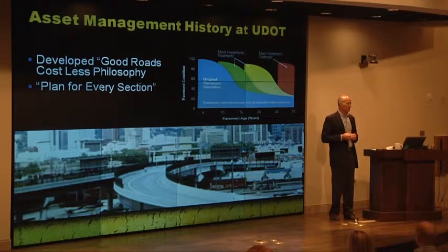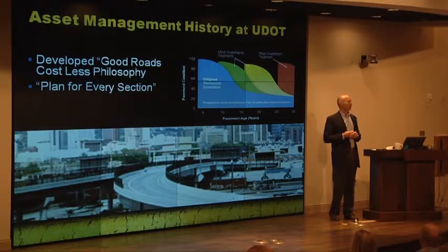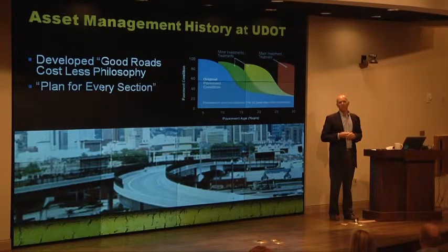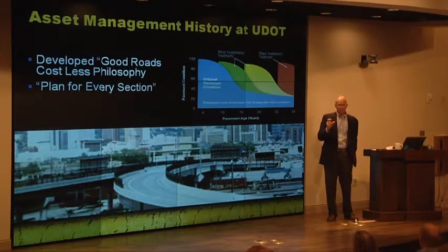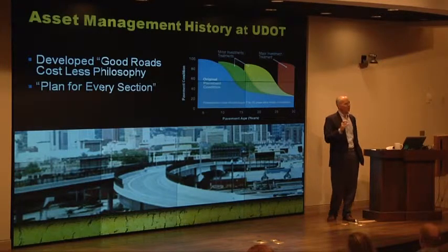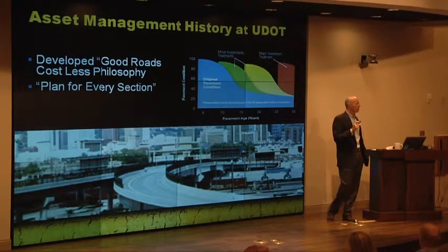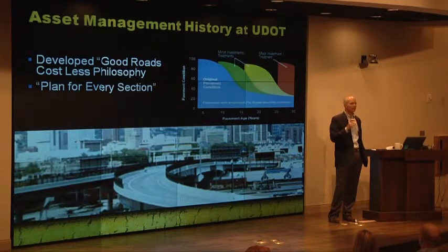And we started off saying we want a maintenance contract for 20 years. And the bonding companies came unglued. They just said, no way, we're going to issue bonds to cover a 20-year maintenance contract. We ended up having them bid a 10-year maintenance contract for this job. And they had to give us a price. So it wasn't part of the original bid price for this project, but it was a number that sat out there. And we had the option of whether or not to execute this up till 2 months before we had substantial completion on the project.